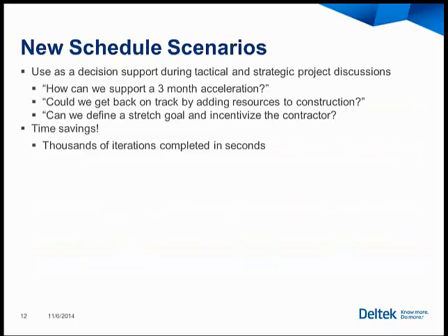Same vein. Could we get back on track by adding resources to construction? If the answer is yes, we have more questions to ask. Are those resources available? Can we get contract labor in a short turnaround? And if we do, will those resources be experienced enough for the type of construction that we're doing so that they'll add value rather than being a drain on the program?